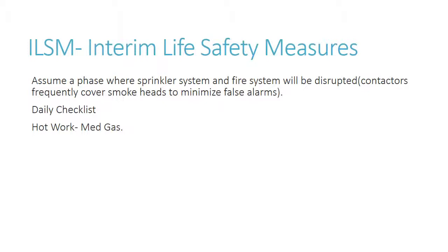ILSM, assume a phase where the sprinkler system and fire system will be disrupted. Keep in mind that contractors frequently cover smoke heads to minimize false alarms. That's something else to keep in mind. You're going to want to find and review a daily checklist. That's a requirement that the space is checked daily. And then you want to assume that there's going to be some hot work as it relates to med gas for this project.